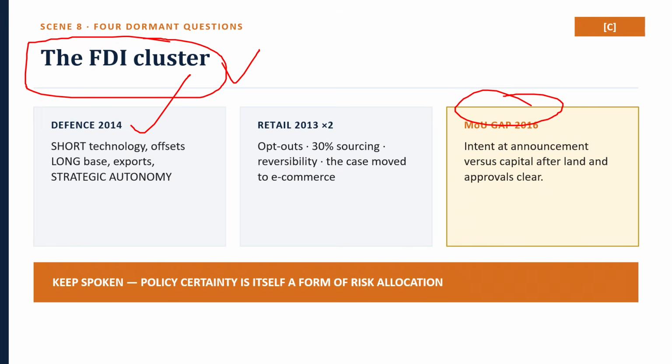And that is the same finding this chapter makes about PPP. The survey's own words, outcomes are weakest where land acquisition clearances, demand assessment, or utility shifting remain unresolved. An unconverted MOU and a stalled concession are the same failure wearing different paperwork. So remedial steps, and make them follow from the diagnosis rather than from a generic list. So retire the risk before the signature, not after. So pre-cleared land, pre-approved utilities, prior demand assessment, publish conversion rates rather than announcement totals, because what is measured is what gets managed. Give single window clearance real statutory teeth rather than a portal, and accept the honest qualification.